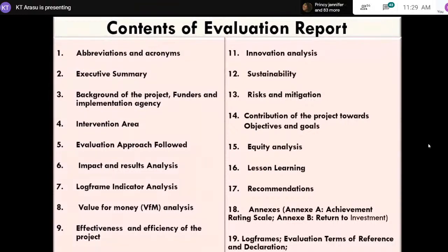So that involves more research. External resources will be mostly useful. Sometimes in-house resources may be less. So for that, you have to plan from the beginning. That is why the evaluation methodology must be decided from the beginning and budget needs to be allocated for this purpose. You are talking about ex post evaluation, at the end, after implementing the project. For that, resources need to be allocated, and then you can learn a lot about the sustainability and the benefits of the project in a different way. That's why research evaluation plays a big role.